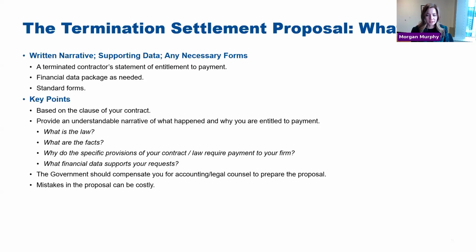And a lot of what's going into this is, one, you're going to want to make sure that you've created a plan as you're preparing to submit your termination settlement proposal. Why do you want to create a plan? One, there's a deadline. There's that 1-year deadline that Evan previously mentioned. Two, you're going to need to get folks into place to help make sure that you are actually recording all of your costs properly. Oftentimes you're setting up a new charge code, and you're going to want to make sure that you're tracking allowable versus unallowable costs, as well as any costs that might be directly associated with unallowable costs. So there's a lot of tracking that's going on.